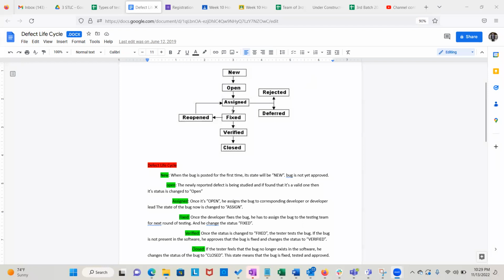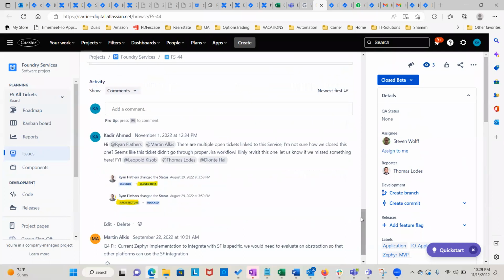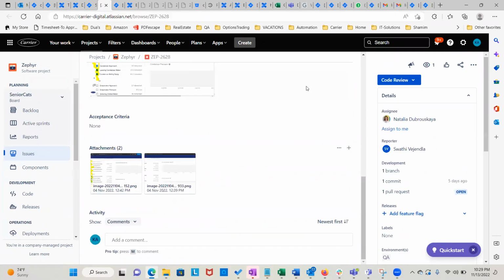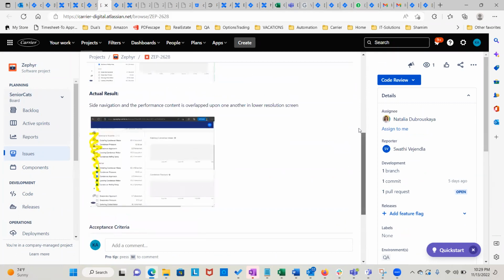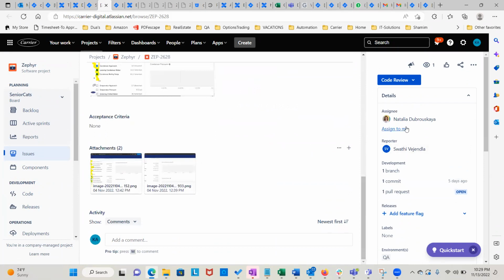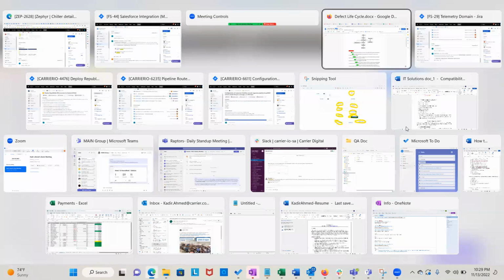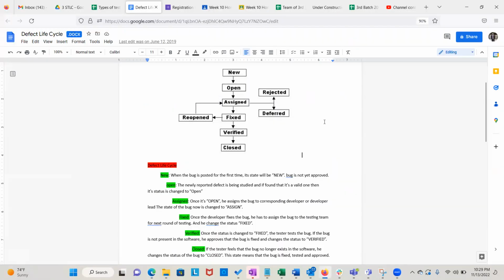You're saying when the developer fixes the bug and you retested and you feel like it's not fixed, right? Yes. So then that's when we reopen it again, right? Yeah, you reopen it, you provide evidence, you say, hey, I have retested this bug, the issue still exists, you just provide a screenshot and you just reassign the ticket to the same guy. Got it. Okay. I think I was just confusing myself. Okay, thank you. Yeah, that's good.